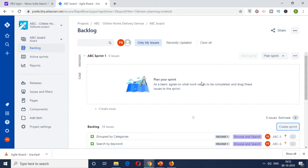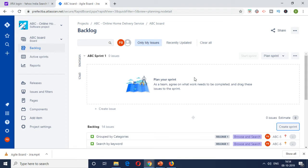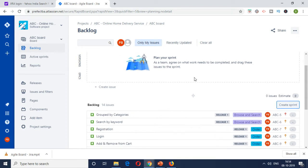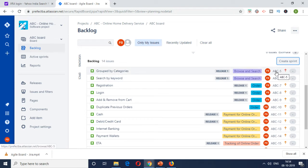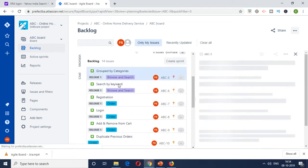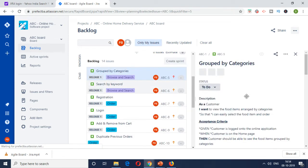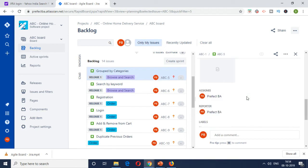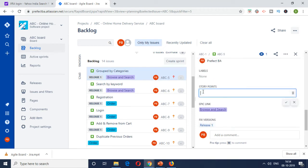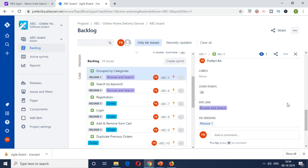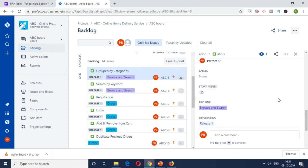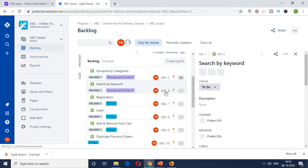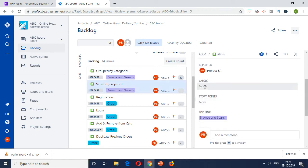So let's say the sprint has a capacity of a hundred story points. Again, this is the first sprint for the team. They might not know. So they are taking it based on some previous experience. So let's say a hundred story points is the capacity of the sprint. So there will be an estimation activity done. So let's quickly look at that and see how we can do it here. So browse and search, I'm just going to put it as 20 story points. So this involves development, testing effort, all the effort required by the team to get it to the done stage. These are the definition of done as agreed earlier. So I'll put it as 20 story points.